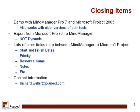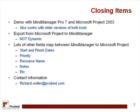You can also, what we demonstrated here today, was exporting information out of MindManager into Microsoft Project. Now if for some reason you wanted to turn around and export information out of Microsoft Project and put it into MindManager, that is also possible. However, one thing to keep in mind is regardless of which way you're exporting or importing, the information is not dynamic. In other words, changes in one, you're not automatically cascading over into the other tool. You have to save another query.